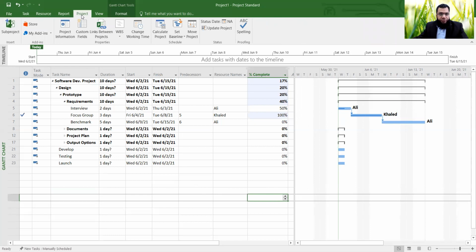So you can go through different options. And again, one of the best ways is to play with the tool. So here you can set up the baseline. You can set baselines multiple times, right? So for example, you set one up now, and maybe after 6 months down the line, the project manager changes. So you can again set up another baseline. That will become your baseline number 2. You can compare your project with your baselines and see how well you are doing.